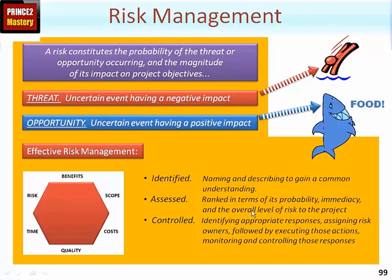Because a project will typically have many risks, we need to rank them. Controlling risks means identifying the appropriate response for each and assigning risk owners. Although the project manager is a central figure, a risk owner may be the project manager themselves, members of the project board, members of the specialist team, or any other appropriate risk stakeholder. Controlling also means monitoring responses to ensure they have the desired effect on each risk.